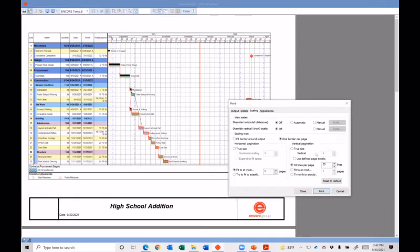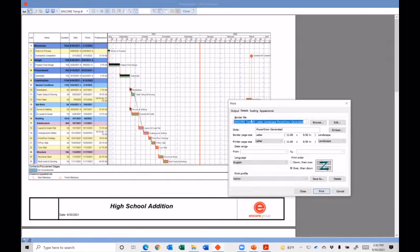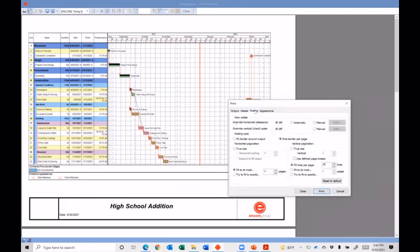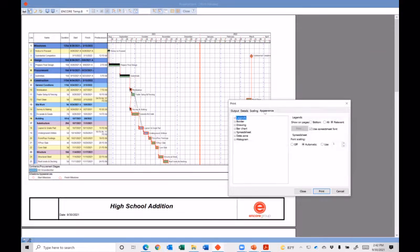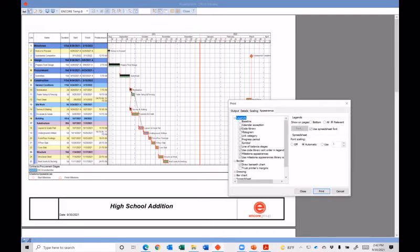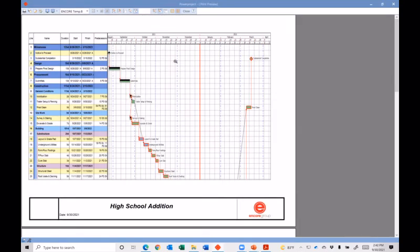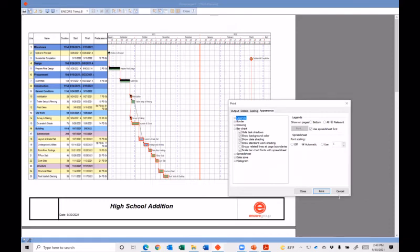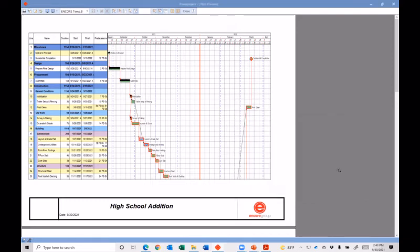I can go in here and customize in my scaling where I want it to fit. If I were going to do a three week look ahead on my scaling, I would come in and set up my details to go landscape. And then my scaling, I would set it up to just have everything fit one page wide. And then under my appearances, here's where I can set up different shows. I can turn my code library off, see these milestone appearances, things like that. I can turn those off. I can turn all of these different settings. You can play around with those and it'll turn things on and off and get you a really nice print for you there. So these are in the appearance settings.